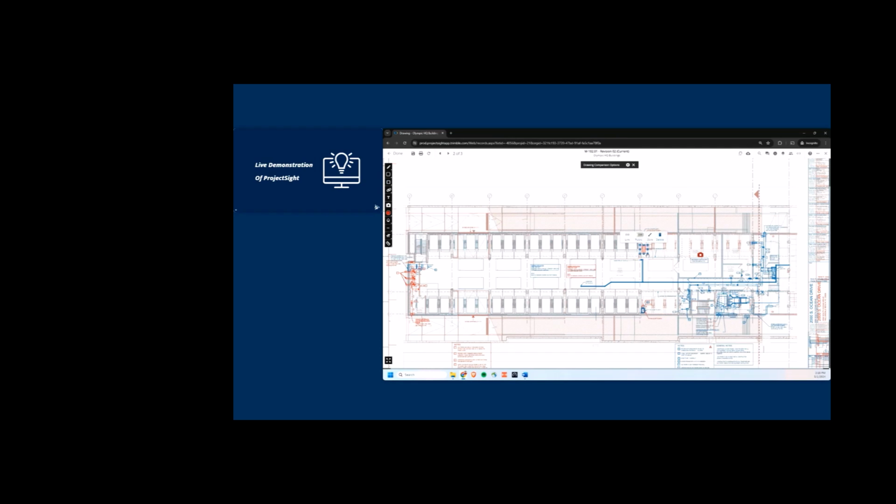And while you're doing your constructability review, that's the best time to find issues like that, right? Because you haven't built the building yet. But what if you already built the building and your super's out in the field and notices the hole in the ground is in a different spot than the hole in the ceiling, and the duct is straight because he can see that from the mechanicals? So that super can jump on his iPad and look at this same drawing and actually create an issue to track from that very place on the project.